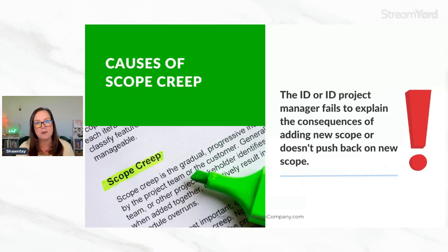But if this is really important, then we can put this on our backlog. And whenever we iterate and go into building version 2, then we can add this feature into the project, right? So we've just got to be in conversation and dialogue about what is realistic given the scope and the timeline that we have, and then what can be carried into a future iteration of that project.